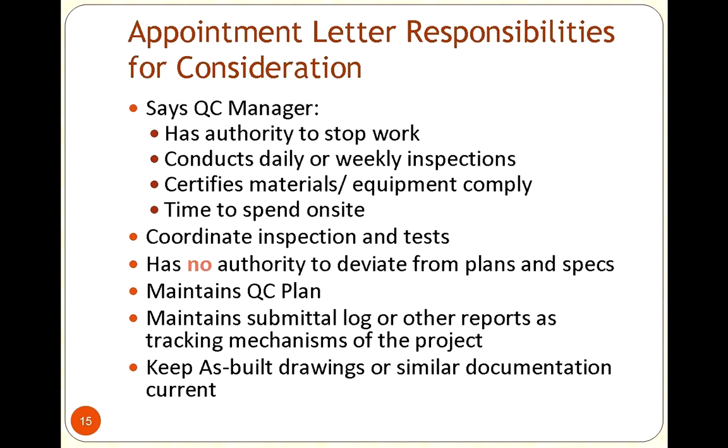But the other thing about this quality control manager is he is basically the one who's maintaining the plan, making sure that it's being enforced. He also makes sure if there's any documentation. If someone submitted an as-built, a drawing, a list of specs, a list of material safety data sheets, any of that information that was submitted from a contractor for our records, we wanted to make sure we had it documented, that we received it, and we would also sometimes document where we stored it at.